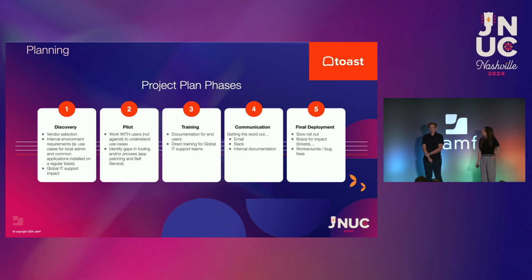And for our final deployment, we decided on a slow rollout relative to the timeline of our project, of course. And we would so-called scream test our solution and give our help desk some room for troubleshooting new tickets and allowing our engineering team time to identify any workflow issues with the changes we were making.